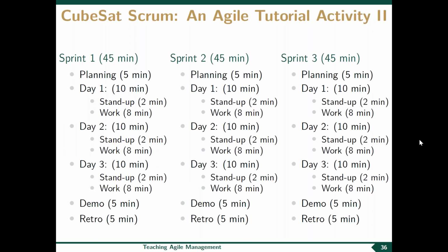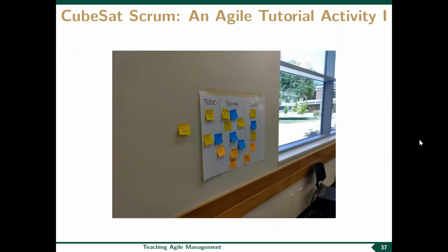They all look the same. We start with 5 minutes of planning and 3 days of each 10 minutes, starting with 2 minutes of stand-up where the students or the team members just talk about what they're going to work on, what still needs to be done, what they completed the previous day, and then 8 minutes of work. And then at the end of each sprint, there's a demonstration and a retrospective.